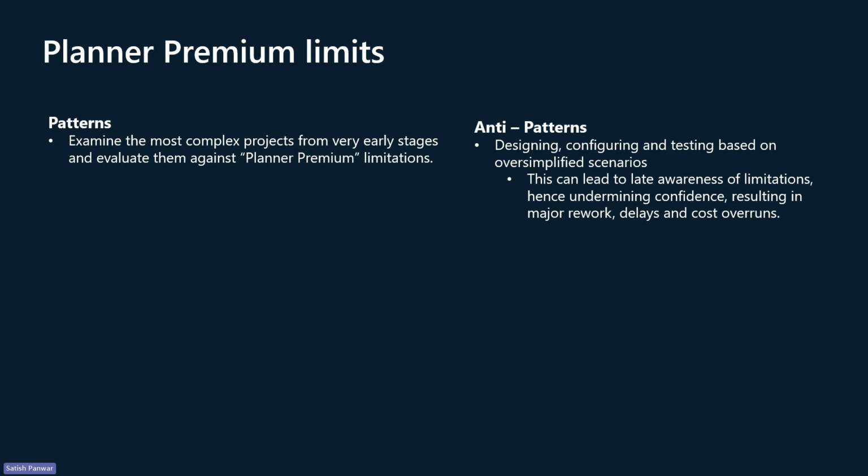It is not recommended to design, configure, and test based on oversimplified scenarios that can lead to late awareness of limits, hence undermining confidence, resulting in major rework, delays, and cost overruns. To avoid this, please review the limit document carefully and identify the high-risk scenarios or transaction patterns earlier in the project.